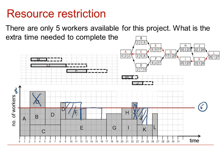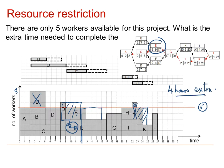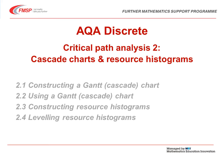But then to get it below 5 workers we're going to have to move E. That means E is going to have to move to start at time 12, to produce a hole here for the block for D to fall into. So the start of E is going to be delayed by 4 hours. Of course E is on the critical path, and therefore the whole project will be delayed by 4 hours. But we can do it — 4 hours extra time is needed. That completes this video on resource levelling and also completes the series of videos Critical Path Analysis 2.